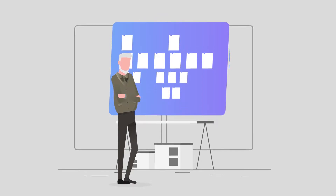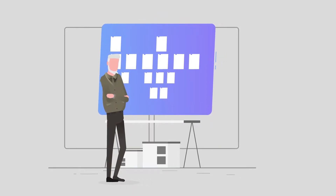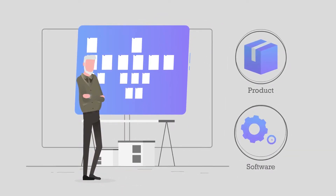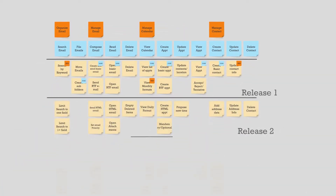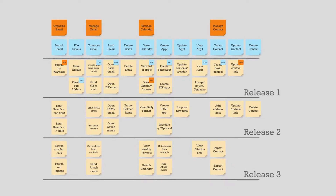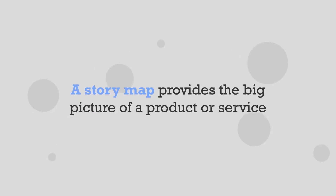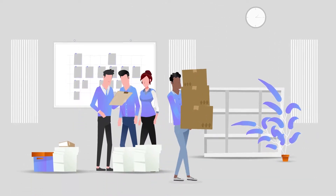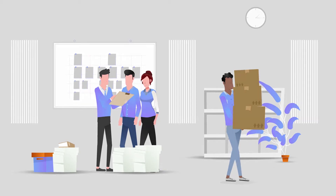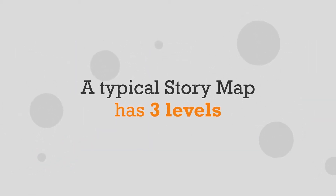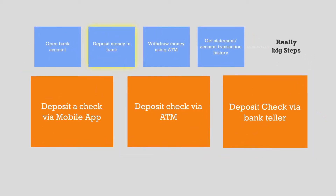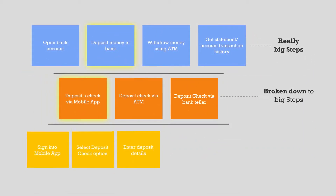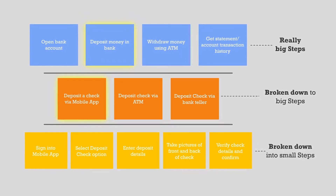Story Mapping is a technique originally created by Jeff Patton that helps product and software teams describe a user's journey through story maps and identify the various features needed in a product to support that journey. A story map provides the big picture of a product or service and helps teams break it down to detailed requirements. A typical story map has three levels: the really big steps of a workflow at the top, broken down to big steps below that, which then get broken down into small steps at the lowest level.